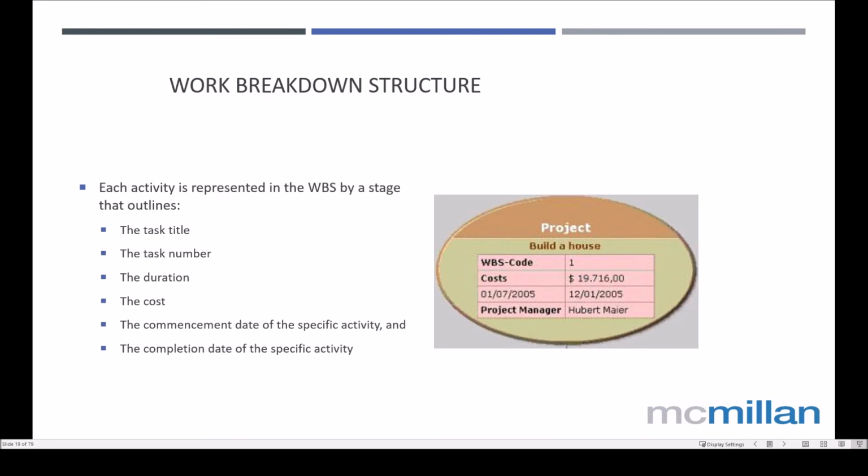And just to break it down, every work breakdown structure is modified to be fit for purpose. From a traditional theoretical perspective, these are the components that you'll find in a work breakdown structure. You'll have a code, and you'll see the code when I show you a Gantt chart later. You'll see that the code is really important in terms of being able to link information on a Gantt chart to the work breakdown structure or any other documentation where we're taking info from one and putting it in the other. The code becomes important to help us to connect the dots.